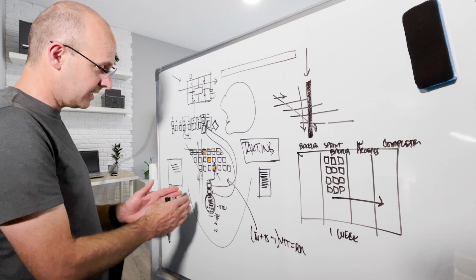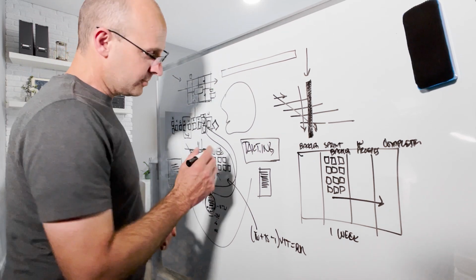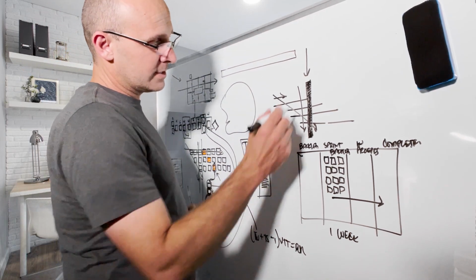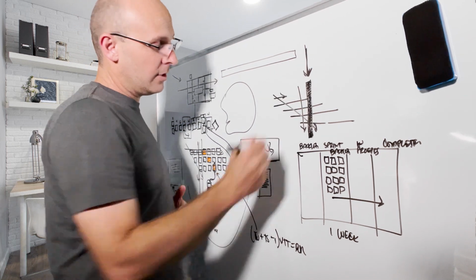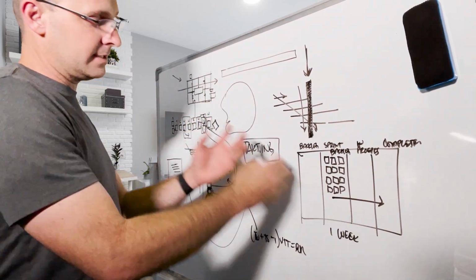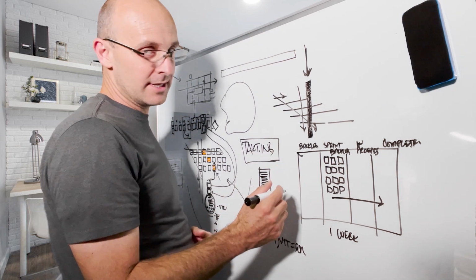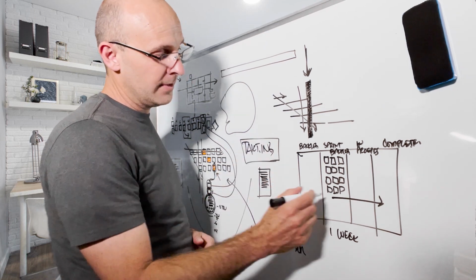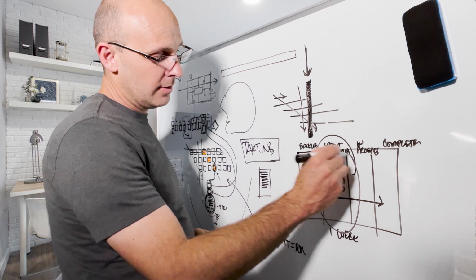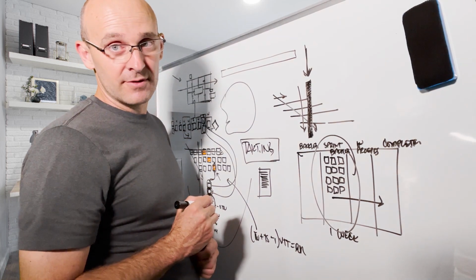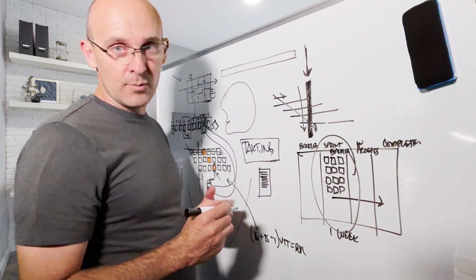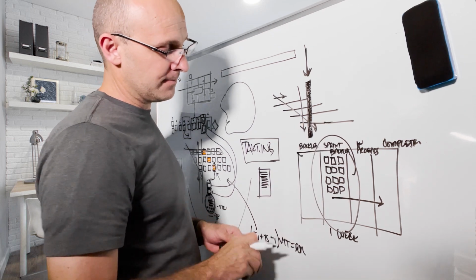And those work steps can be recalled either from Excel or Takting or Timoti and come in here into either your Last Planner system or Scrum to fill out your sprint backlog for that week sprint, or for your weekly work plan in the Last Planner system.